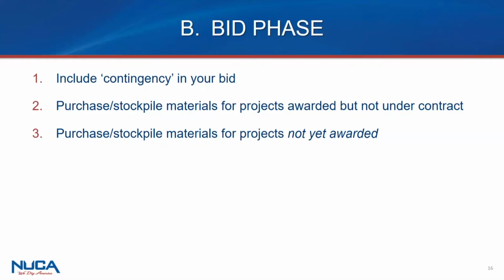Another recommendation at the bid phase is, if you can and have the financial ability, purchase and stockpile the materials. In other words, if the nature of the work that you're doing is such that you're going to be using those materials, whether it be on the pending project or future projects, lock it up, stockpile it now, put it in the yard if you can. Way to both control costs as well as minimize problems associated with trying to obtain the material.